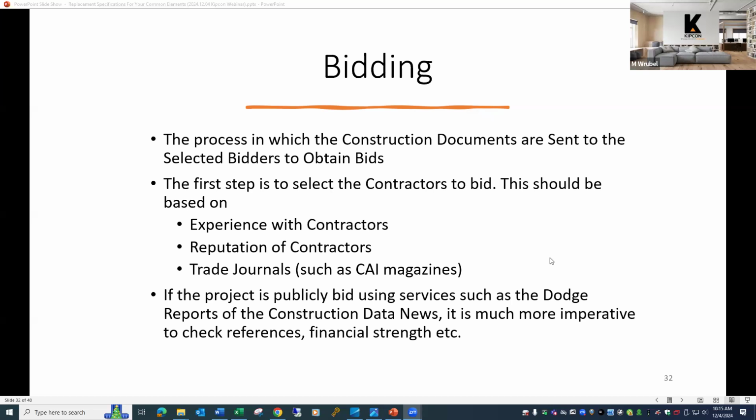So many times, and I want to stress here the importance of having specifications prepared and having a standard bid form prepared for contractors to bid on. Oftentimes, HOAs will go out to bid and go directly to contractors, and they'll receive 3 different bids with 3 different scopes of work. And they'll ask me to help them select a contractor, and that's just not possible because I don't know why any particular contractor selected that scope of work, or what their bid is based on.